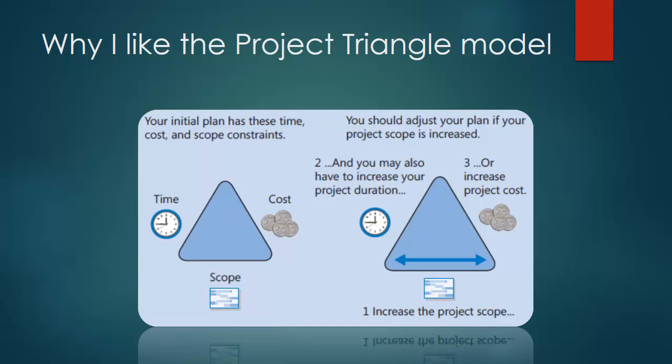But the other very common case, I think, that often people will say, oh, that's scope creep, is this. We set out to produce a particular deliverable, and we think we know what we are doing when we build the plan, and then we start work, and we discover we don't really know everything involved here, and wouldn't you know it, it turns out there's a lot more to doing this kind of a project than we had thought. There's a lot more work here than we had thought. Now, is that scope creep? I'd say no, because you're not redefining the end result. That's just discovery. That's just normal project manager discovery.